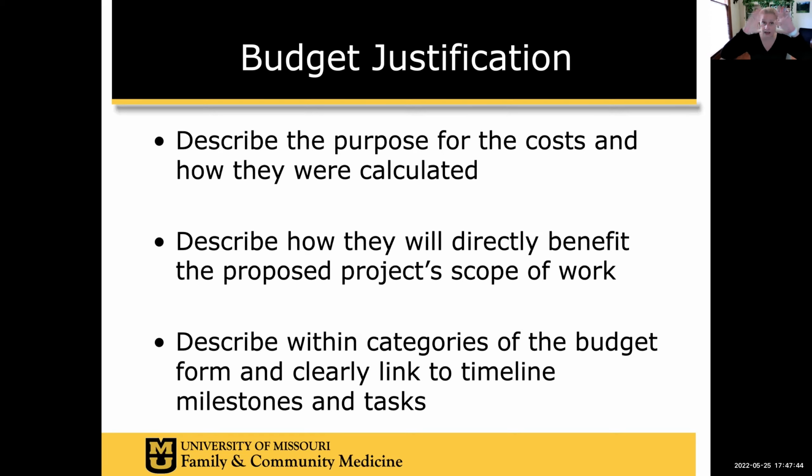So when you're doing this, I gave you some big buckets in your budget. That's linked to the typical budget format for CIHR. What I suggest you do is figure out what you need in a detailed Excel spreadsheet, then move them into the buckets, and then make sure it lines up with your timeline. So you've got these different ways to make sure you haven't missed something, and your tasks. If you're putting in ethics approval, are you doing that yourself? Are you going to compile the 82 different forms, or are you fortunate enough to have an RA? If you have an RA, put their time that they're going to need to compile all those different things in there.